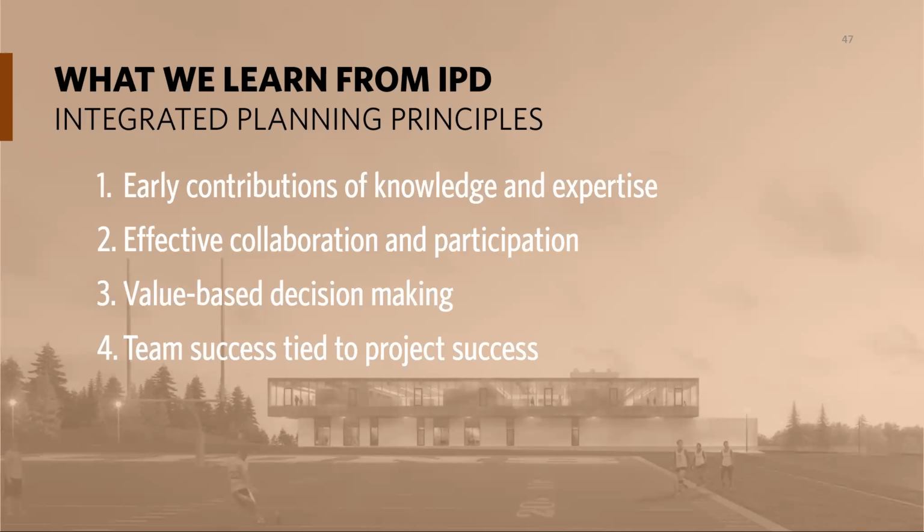We understand that we don't always have the opportunity to do integrated project delivery, but we can borrow some IPD principles for other delivery methods. These are some of those principles: early contribution of knowledge and expertise, effective and early participation in the planning, value-based decision-making, and last but not least, the team's success should really be tied to the project success.